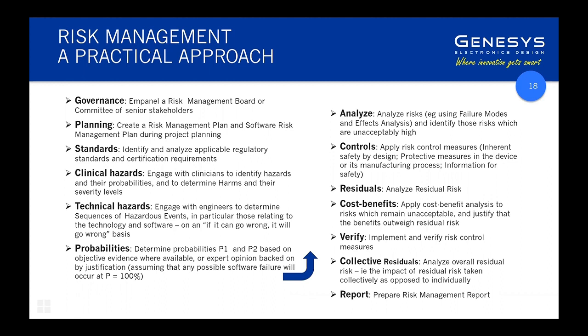The step right at the start of the project is a risk management plan, and we've talked about what it needs to contain, but it's very important that it's a formal, stringent document. And trust me, quality system assessors and certification assessors will be looking for that plan and make sure it existed at the start and wasn't done retrospectively. And they'll be looking for dates and sign off on when you had your risk management plan in place.